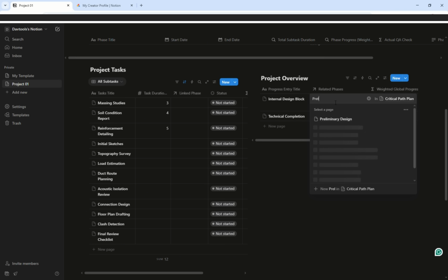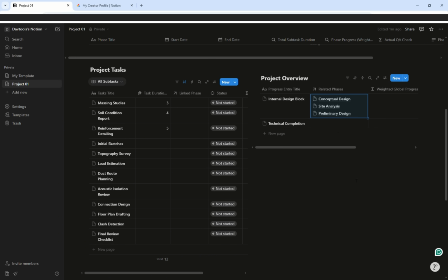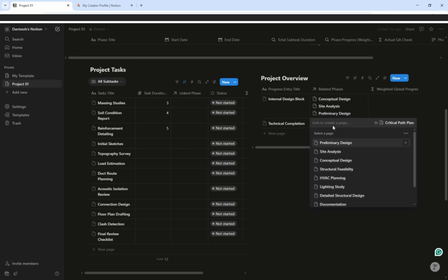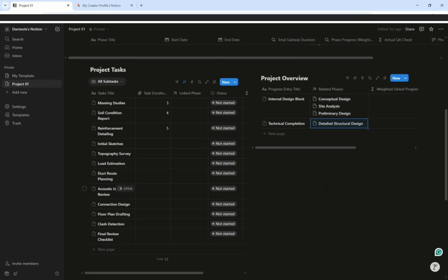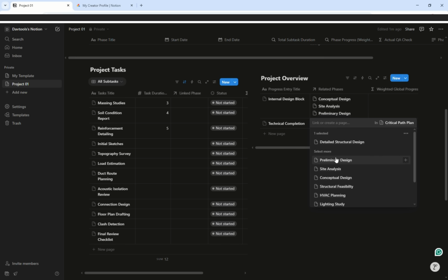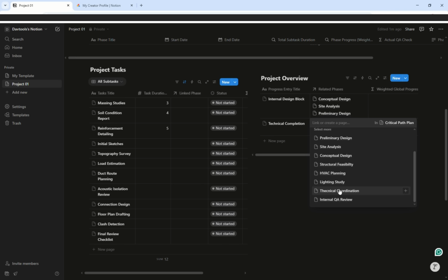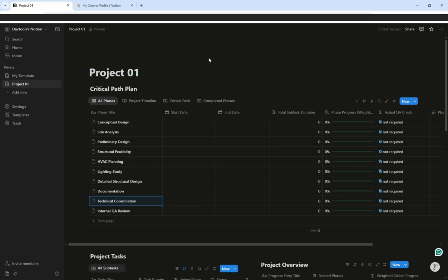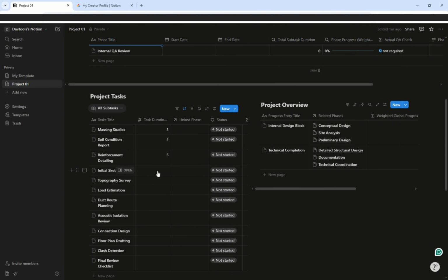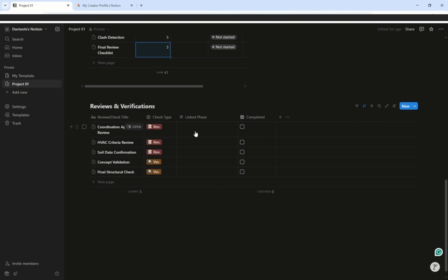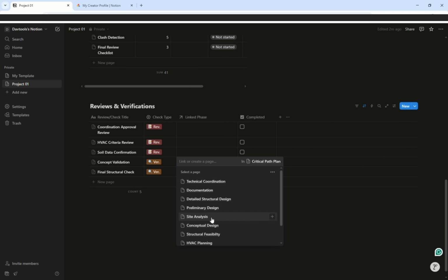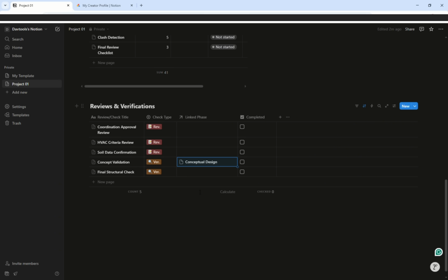We are now connecting the various phases that make up the main deliverables. Let's now assign a duration, in days, to each activity. We know that every activity is part of a phase, so one or more activities will make up a phase. The total estimated duration of the activities will then be compared to the calendar duration of the phase they belong to.